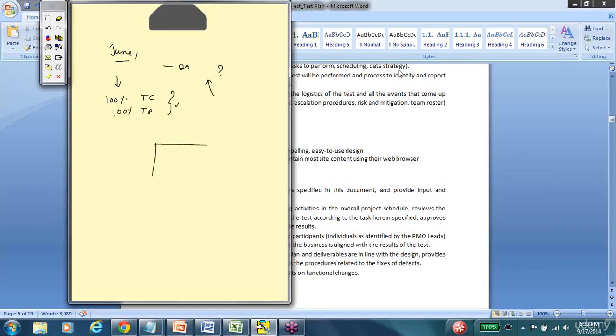So when we write a schedule or a milestone list in our test plan, this needs to be reviewed and approved by the technical team. Otherwise, they might not be ready yet to deliver the developed project, but if we plan to test at that time, it will be a conflict of schedule. Similarly, you will have to check with them and see that the test execution time you plan is apt for them also, because they will have to be available to do the bug fixes.